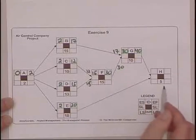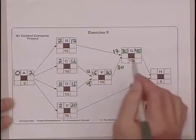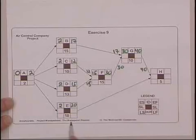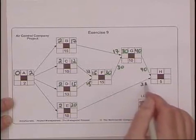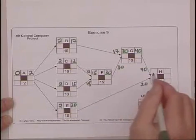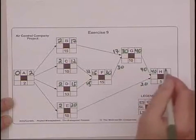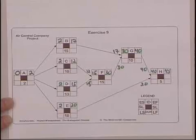And then finally we have the last activity, which is also a merge activity. H can't start until both G and E are done. The earliest G is done is 40. The earliest E is done is 20. We choose the larger number, 40. 40 and 5 is 45. And we would now say that the earliest time this project could be completed is in 45 days, assuming days is the time unit that we're using.